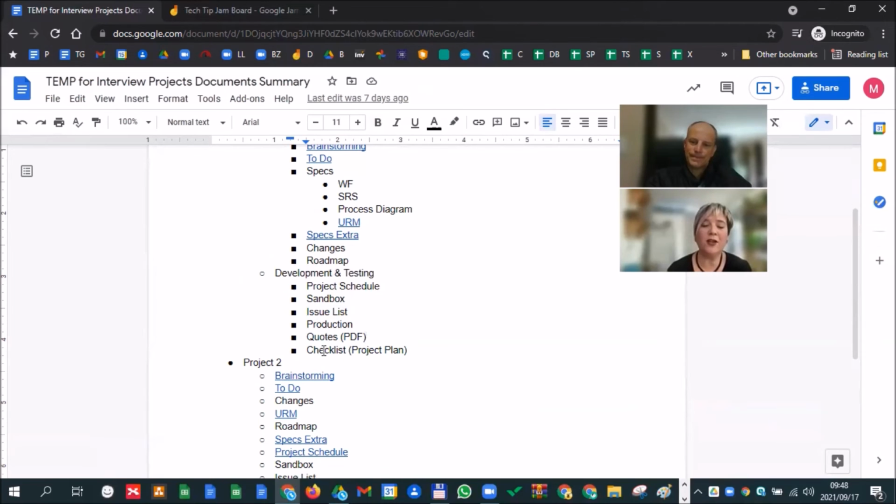Now, I suppose it's also got a place there, because if you've picked up an issue that you didn't quote before, or something dramatically changes because the client has new requirements, then you need that process there as well. What will sometimes happen, let's say something went into production and there was a 10-day period and nobody picked up on it. If it's an urgent issue, we can quickly do it at our hourly rate. But if it's not very critical, you just put it into the next sprint. So you make sure it's resolved then. And the roadmap, we just list it in our roadmap document for the next sprint.